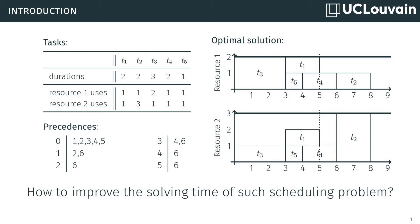Our methodology, close to tabling, compiles all the solutions of a relaxed model in a table in order to use it as a redundant constraint. The relaxed model is created by having another discretization of time. We tried our method on the resource-constrained project scheduling problem.